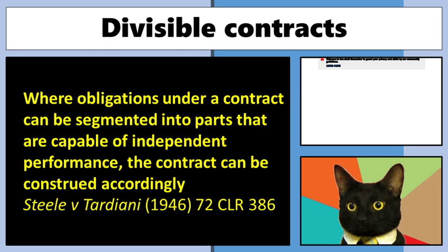Going back to Cutter and Powell. Oh, well, £16, 16,000 miles. The guy didn't do the last 100 miles, therefore we should only get paid £15, and I don't know how shillings work, 12.5 shillings? I've got no idea what it is, back 250 years ago. But there they said no, that's not cleanly divisible. You have to do the whole thing.